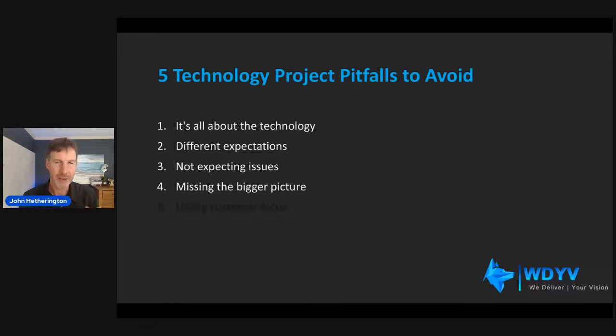Because sometimes, again, we get too focused on our own project. We think our project is the bee's knees. It's everything that we need to focus on. But what if another project comes along and changes the date on it, does a go live or a product delivery or launch at the same date? You need to adjust for that. You don't wait until 2 weeks before your launch to find that you're at the same time as another product launch.